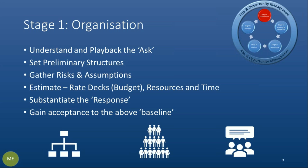Once you've got all that in place, then the work breakdown structure dictionary, that's the way of disseminating the work from the statement of work through the intermediate WBS nodes and eventually to where the work is going to be owned and controlled, i.e. control accounts.